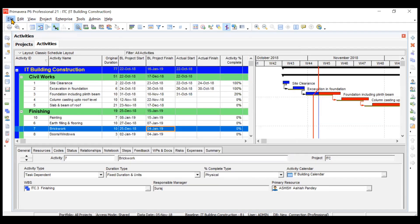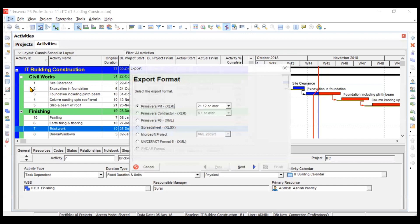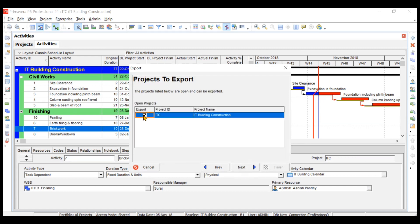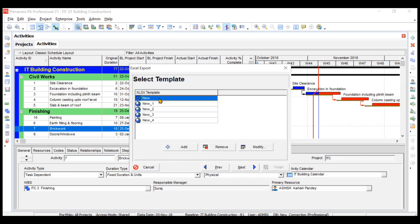Now going back to the Export option, if I want to export in spreadsheet format — similarly you can also export in MSP format. I'll demonstrate the spreadsheet option. After clicking Spreadsheet and going to Next, it asks what data you want to export: activities, relationships, expenses, resources, and resource assignments. You can tick or untick whatever you want. I'll select everything and go to Next, then choose the project.